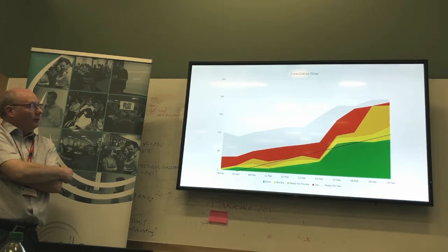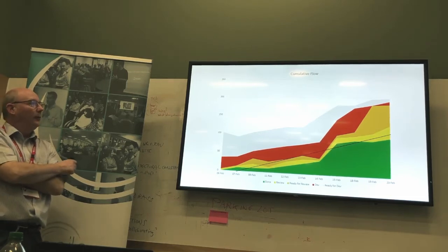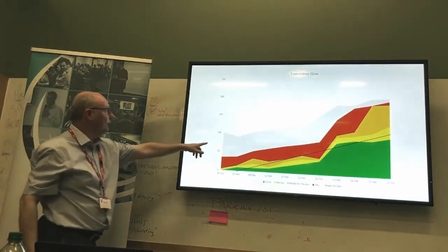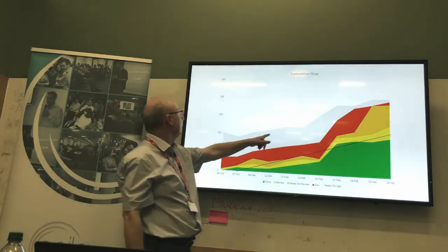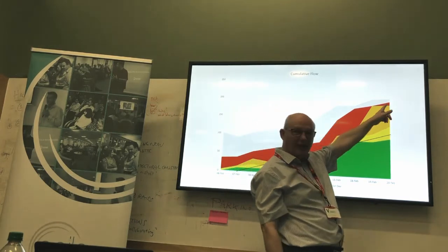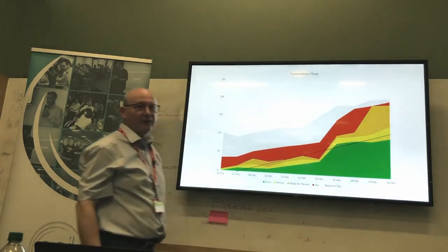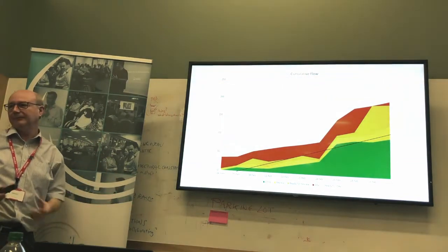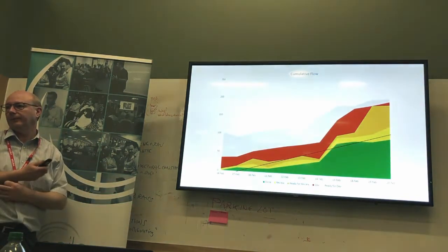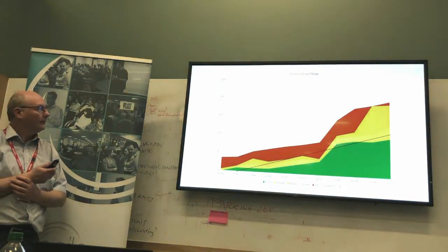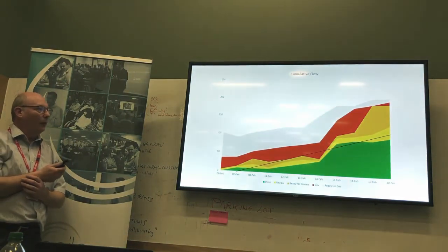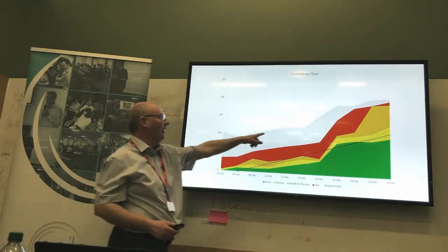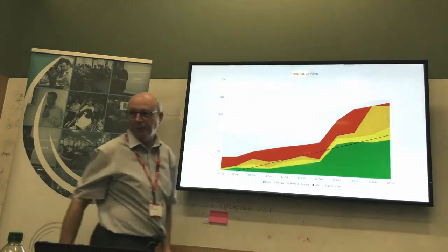I think what you're looking at here is a large amount of instability in the backlog. You can see the scope has gone from about 101 to what, 197? The sprint backlog has not been managed. That's the difference compared to the Burndown, where you can show they almost hit their original deliverables. Except that what they did wasn't their original deliverables, because otherwise this line would have stayed here and it would have been, yay, perfect sprint.